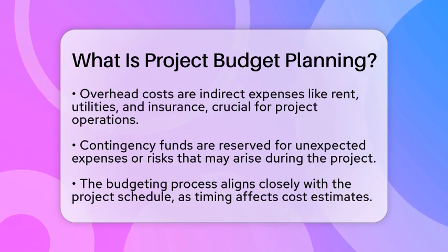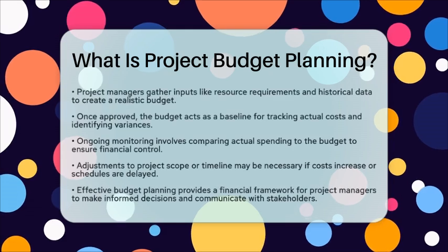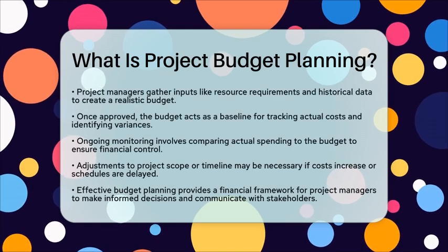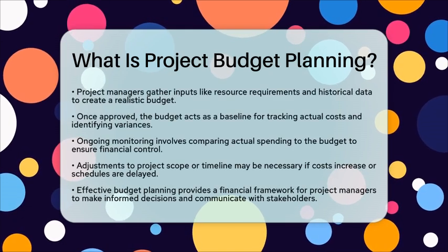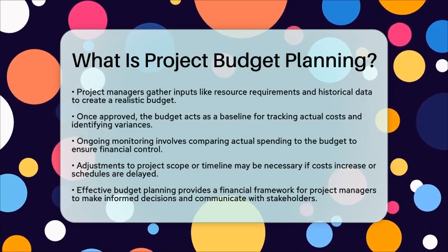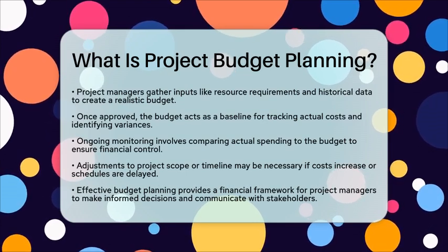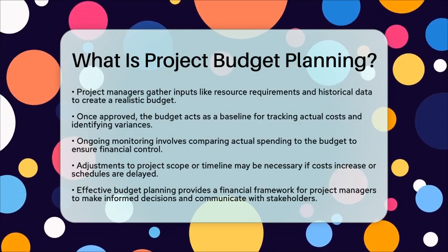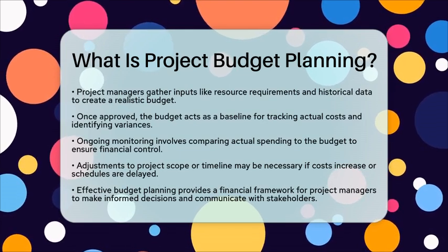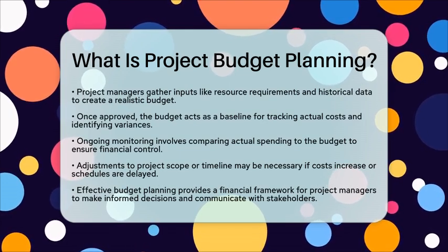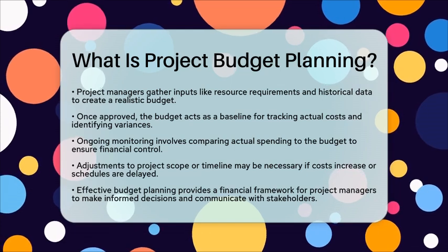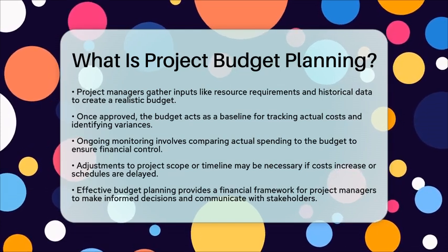Ongoing monitoring is also a big part of project budget planning. Project managers regularly compare actual spending to the budget. If costs go up or schedules slip, they may need to adjust the project scope or timeline to stay on track. In practical terms, project budget planning gives project managers a financial framework for making informed decisions.